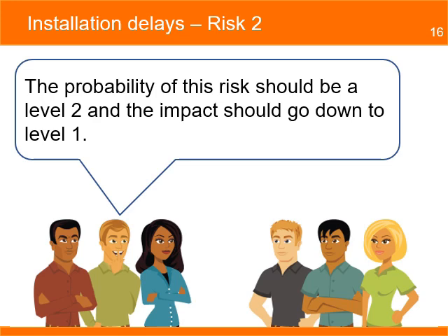The architect reviews the second risk. The risk originally had a probability level of 4 and an impact level of 4. The risk index was 16 and the actions identified to mitigate the risk were to review the design changes to estimate impact on the schedule. After he completed the review, he now believes the residual risk values should be a level 2 for probability and an impact level of 1.